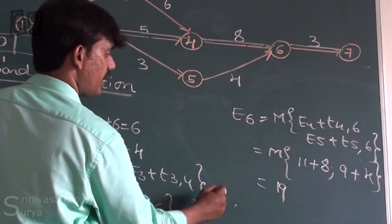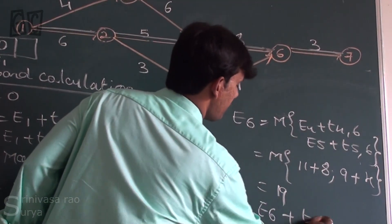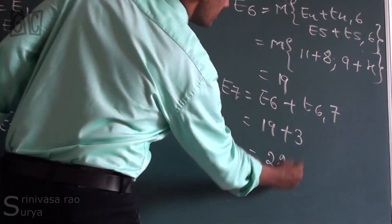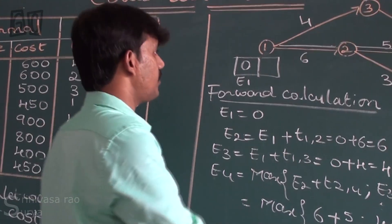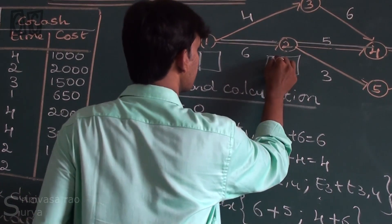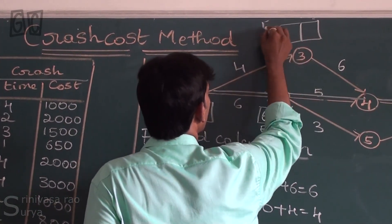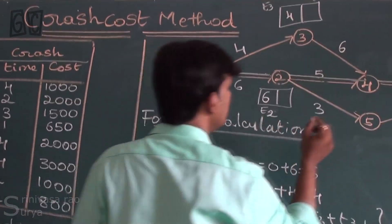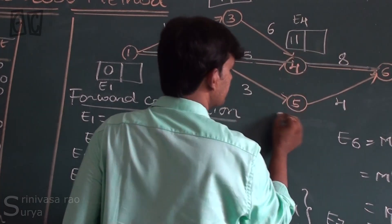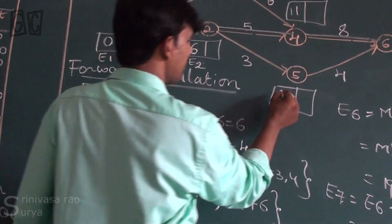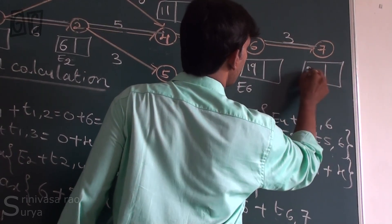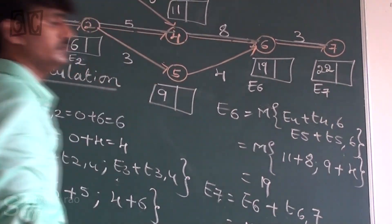E7 is coming from E6 plus time taken from 6 to 7, that is 19 plus 3, obviously 22. To summarize the forward calculation values: E2=6, E3=4, E4=11, E5=9, E6=19, and E7=22.